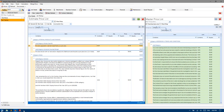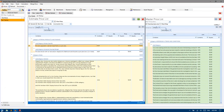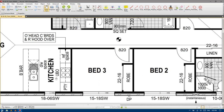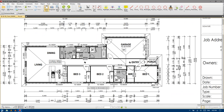Some of our standard designs show a framed-out wall and an actual Hume door pantry, which would be carpenter-made with carpenter-melamine and timber framing around the outside — not your snazzy boxed-out thing with fully adjustable clips. That's why I'm adding that note there on some of these, to reinforce that these are standards where I've made allowance in the kitchen length to have the pantry work undertaken and where it's actually drawn as being part of the kitchen system. This one here would be a cabinet-made pantry, whereas our designer specification refers to a carpenter-made melamine pantry.